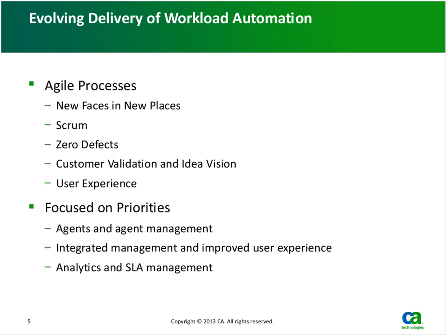Another key aspect of Scrum as we're implementing it is the zero defect policy. The way that Scrum works is that in each one of those little increments called sprints, we're going to be implementing some pieces of functionality, and the sprints are usually 2 to 4 weeks long, so not huge chunks, little chunks. And those pieces of functionality are not considered complete, in other words, we don't get credit for them, we can't demonstrate them to customers, unless we've implemented them, tested them, and fully documented them by the end of that increment. So every 2 or 4 weeks, everything for that new piece of functionality has been updated, tested, and is ready to go out to a customer.